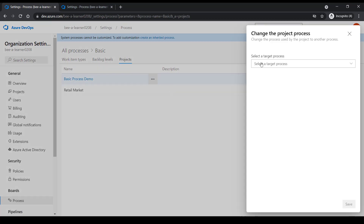If I want to change this project's process type, I can click on the three dots and click 'Change process', which will ask me to choose another process type. This is one way you can change the project process type. I highly recommend not changing the process type during implementation — it is something you want to decide when creating the project, choosing which process or methodology you'd like to use to plan your work.